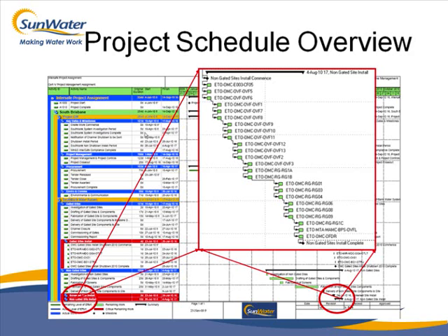While we're here, we'll have a look at PERT analysis. Now, PERT analysis, we just assess activities. What are they going to be, their duration, basically. We look at the optimum time we would like it to be done in, the realistic time, and the sort of pessimistic duration.